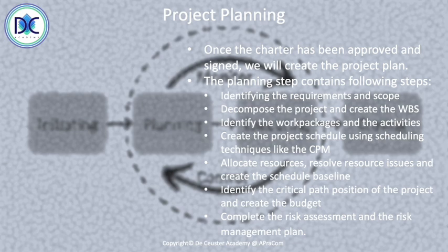We also look at the critical path position, we look at the budgeting, so we can calculate the budget in early start, late start, and planned start, and the relative position of the planned start cost curve to the early start and the late start cost curve is what we call the critical path position. The closer we are to the early start position, the more flexibility we have in the project. The closer it is to the late start position, the less flexibility that we have. Based on this financial information, we can create the budget and allocate the budget allocations, which depend on the financial